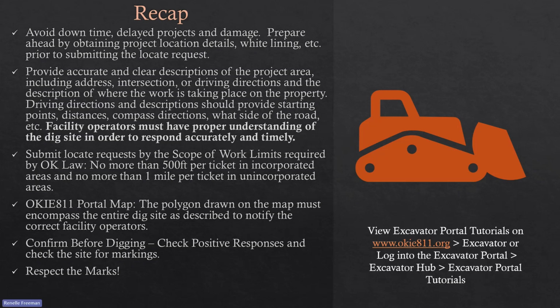So just a little recap here. Starting off with excavator responsibility and preparation: avoid downtime, delayed projects and damage. Prepare ahead of time by obtaining your project location, white line the area prior to submitting the locate request, get your contact person established, and your work start date and time.